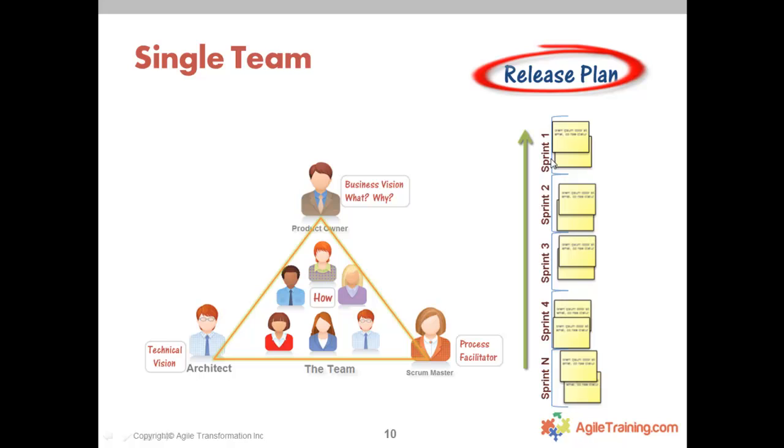This team is probably working in sprints that are 2 weeks or 3 weeks, maximum 4 weeks, and they're consistent, and everything that's in their backlog at this level is down to the story level, right? So probably features and stories are here. Stories are these small deliverables that I can actually get done within 2 to 3 weeks. So we've broken down all the work into such a small chunk that they can actually get accomplished.